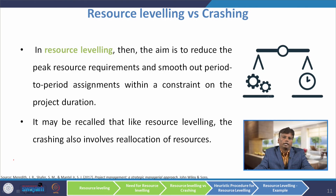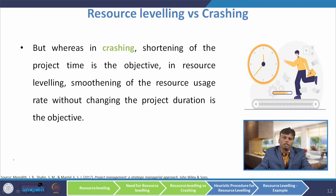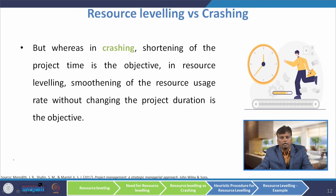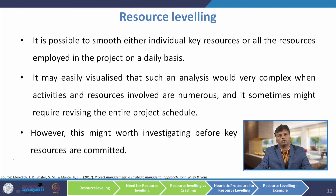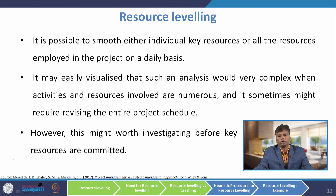It may be recalled that, like resource leveling, crashing also involves reallocation of resources. But whereas in crashing, shortening of the project time is the objective; in resource leveling, smoothening of the resource usage rate without changing the project duration is the objective. In crashing our aim is to reduce the time and cost, but in leveling the level of resources should be kept equally constant — that is the objective of leveling. It is possible to smooth either individual key resources or all resources employed in the project on a daily basis. Such analysis would be very complex when activities and resources involved are numerous and might require revising the entire project schedule. However, it may be worth investigating before the key resources are committed.